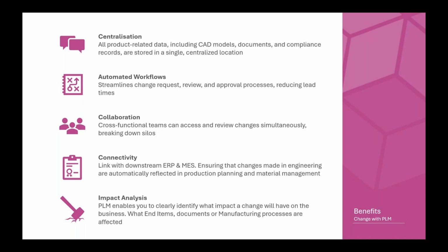Let's say if you've got a document that's got a spelling mistake in, you can quickly do an impact analysis to find out whether maybe that document's just used internally and we can go ahead and make that change without an issue, or maybe that document is translated into 15 different languages and there are thousands of copies already out there in the world. So that's going to impact whether you commit to a change or decide to handle the problem as and when it arises from your customer base, let's say.